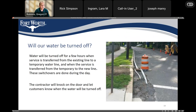During construction of water lines, there will be times when your service will be interrupted. Water will be turned off for a few hours when your water service is transferred from the existing line under the street to a temporary water service, so that we can replace the water line with a new one, and your water service will be minimally interrupted. Before this happens, the contractor will knock on your door to let you know when the water is going to be turned off.